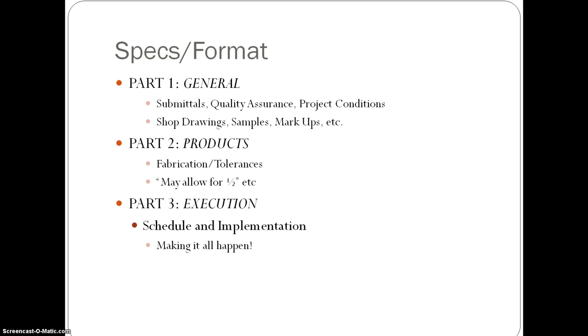Then you have part 2, which is about the product. So it's about the fabrication, tolerances for spacing, etc. And then part 3 is the execution, which is the schedule and implementation, where you're making it all happen.